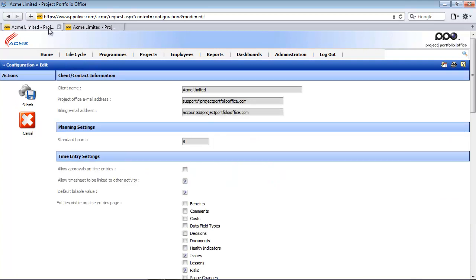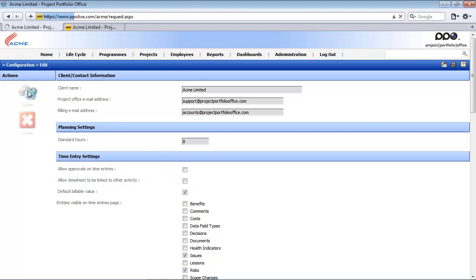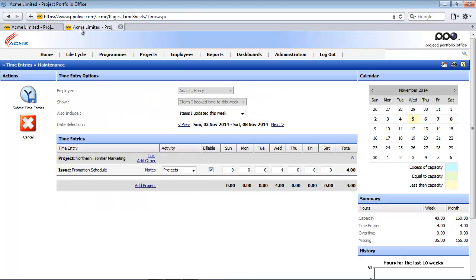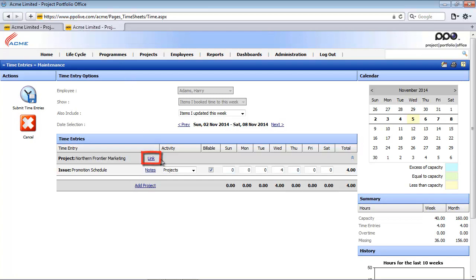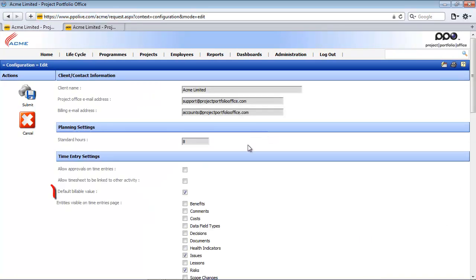So if I return to the first tab and I disable or I uncheck this option and I submit and I access my second tab and I simply refresh the page, you will notice that that option has disappeared and I can now only book my time against tasks, issues or risks on that project.